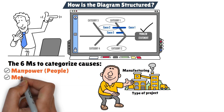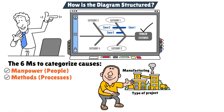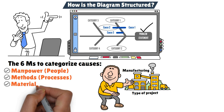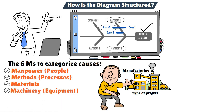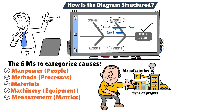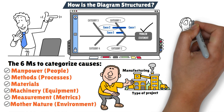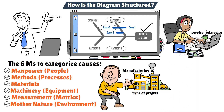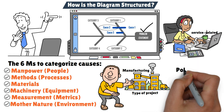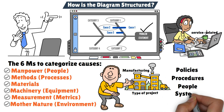The six M's are: Manpower or people, Methods or processes, Materials, Machinery or equipment, Measurement or metrics, and Mother nature or environment. If you're working on a service-related or non-manufacturing project, you may use different categories such as policies, procedures, people, and systems. The flexibility of the Ishikawa diagram is one of its strengths.